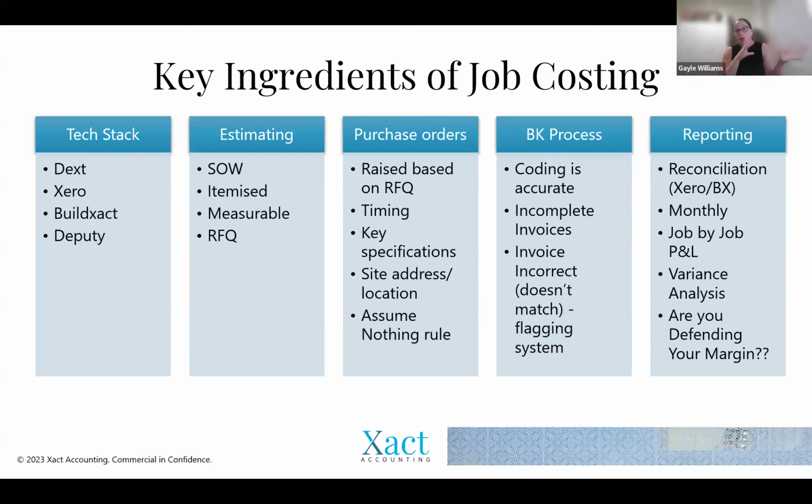The final part of all of that, so that whole journey of the cost from when it first got estimated, got put through your system, through a PO, the invoices come in and are paid. Ultimately, the idea is so that you can then run reports at the end of every month to identify what's going on job by job, to be able to really deep dive into any variances.